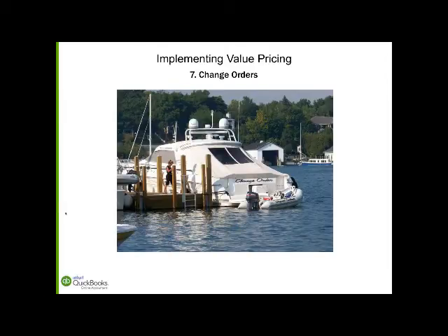The seventh step is dealing with scope creep. Scope creep is when something comes up that neither you nor the customer anticipated, right? You hire a contractor, say, to build a family room, and the contractor's crew comes out and they smash out a wall to begin construction, and they notice that you have dry rot and termites. Well, that probably wasn't in their original bid, and now the work crew's going to stop.